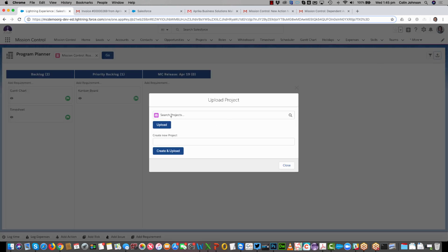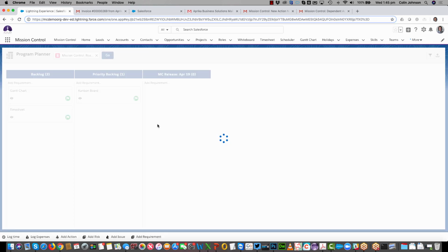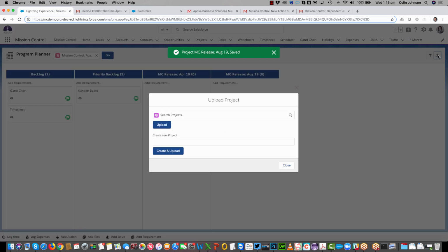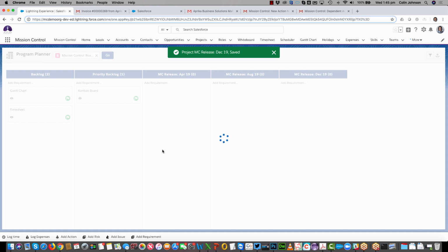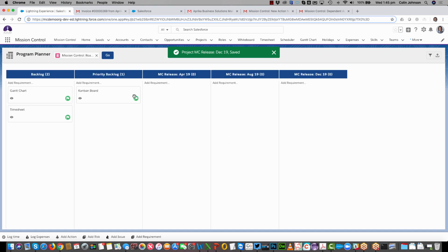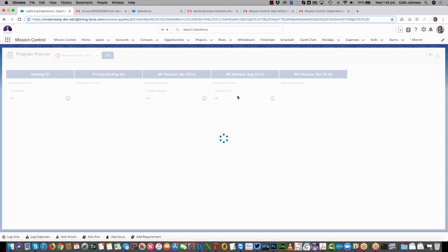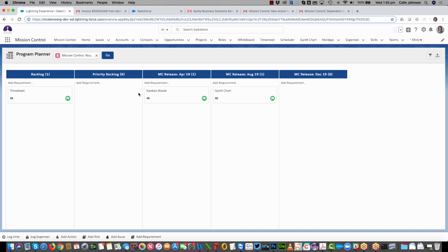So then I might want to add in another one. And again, I've got another release planned in August, so I can start assigning what I'm going to get done there. And then finally, if I want to say, well, I'm looking to get another release in, but it doesn't exist yet, so I'm going to just quickly create a new project directly from here and associate that to the program. So as I do this, I can say, well, I'm going to get my Kanban done in the April release. I'm going to get my Gantt chart done in the August release, and so on.